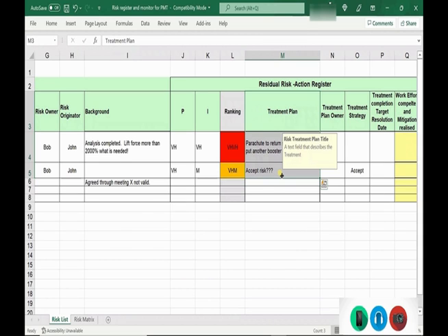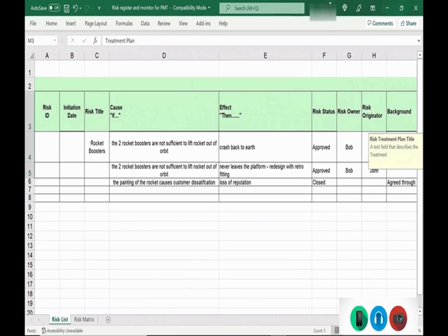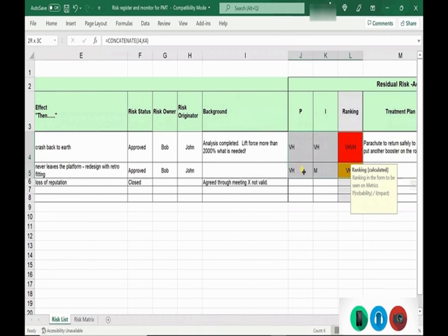Okay, once you've got to that stage, you want to go round that loop again. So you want to go back and review the risks. You want to be very careful that you're not just completely blinkered, so you're considering what new risks are potentially being realised. It's why it's good to go back to the Pestel approach to just reaffirm has anything changed. And it's especially important to do risk analysis or assessment if anything does change. But once you've gone round this loop a couple of times, then you can start seeing the mitigation and hopefully the risks dropping.